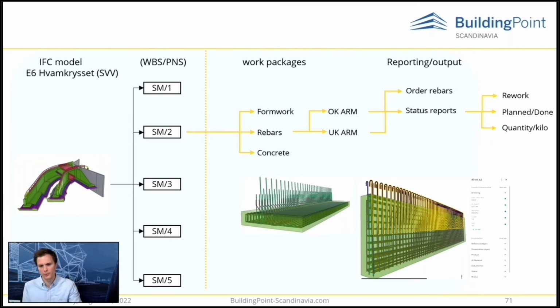So both the physical breakdown structure of the model and the information system, the information breakdown structure, affect how buildable the model is when we're talking about limiting the amount of drawings necessary to show details. So this culvert is part of a project where they would attempt to have little or no detailed drawings, and therefore have more information on the model objects, and they would have a better setup of the physical model breakdown. And with good information and a good model breakdown, we can make better use of Trimble Connect. Yeah, it's a good structural requirement for this project as well.